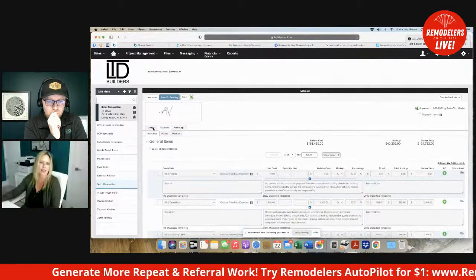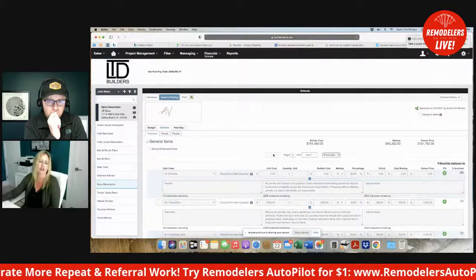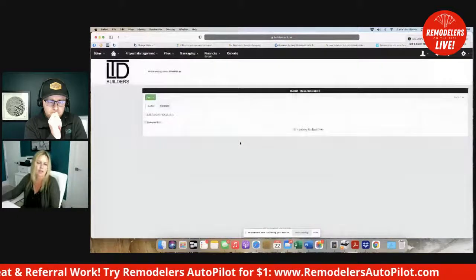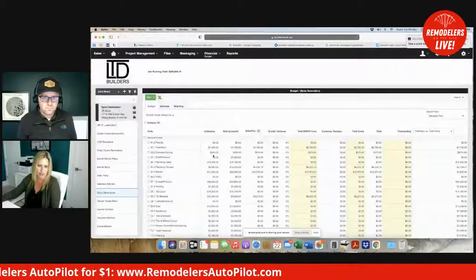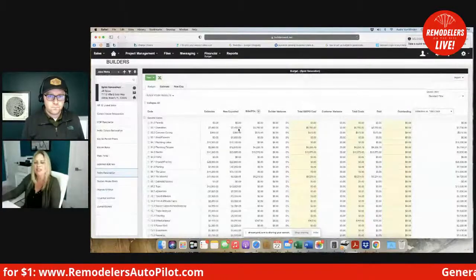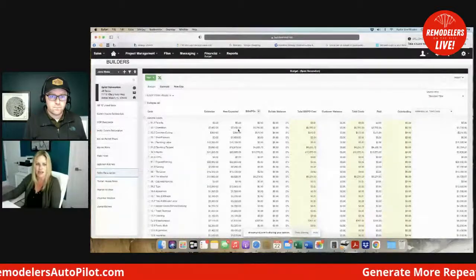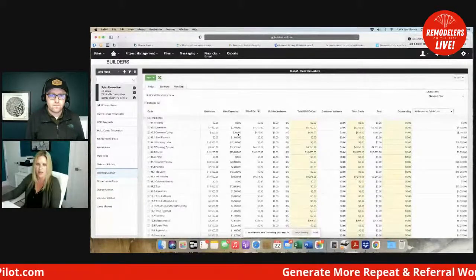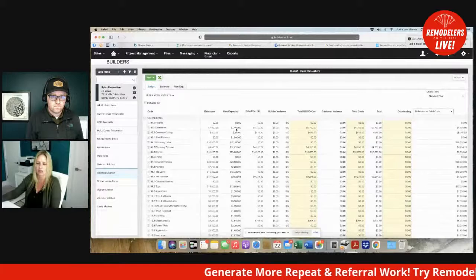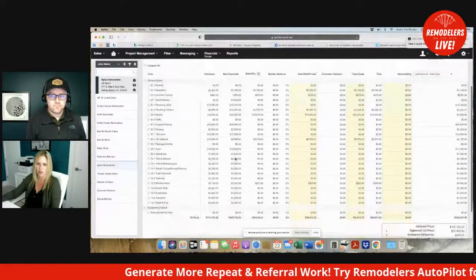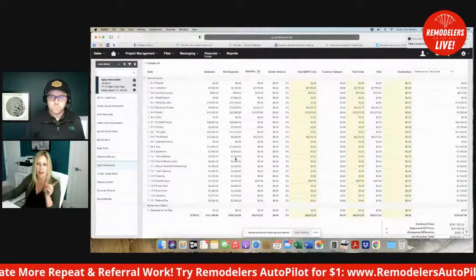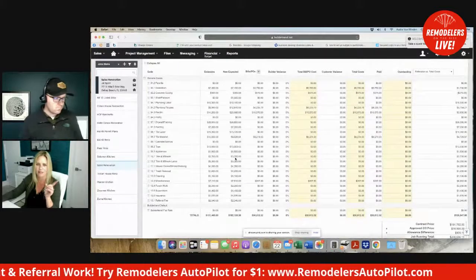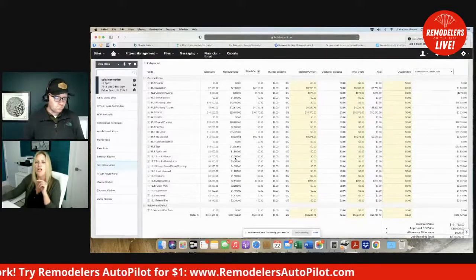And what that does is it locks it in your budget over on this screen. Okay. So you now have your original estimate. This is your proposal. Your new expected is taking all of the data from your change orders and from your selections and putting it into the budget. And Kyle, remind me to go back to invoicing for selections that we want to cover.